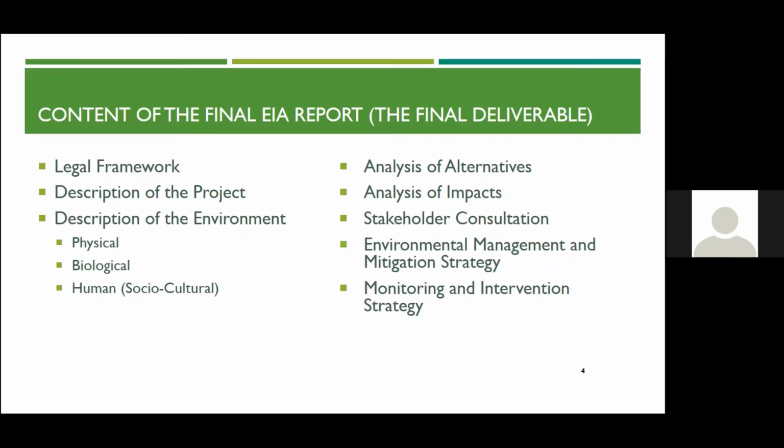In terms of the analysis of alternatives, this chapter discusses the other options that were considered, including any siting, any different equipment. The terms of reference requires that the no action alternative is also considered. Simply put, the no action alternative is what if the quarrying was not undertaken. So this chapter will detail all the rationale for choosing the preferred option over the other choices.